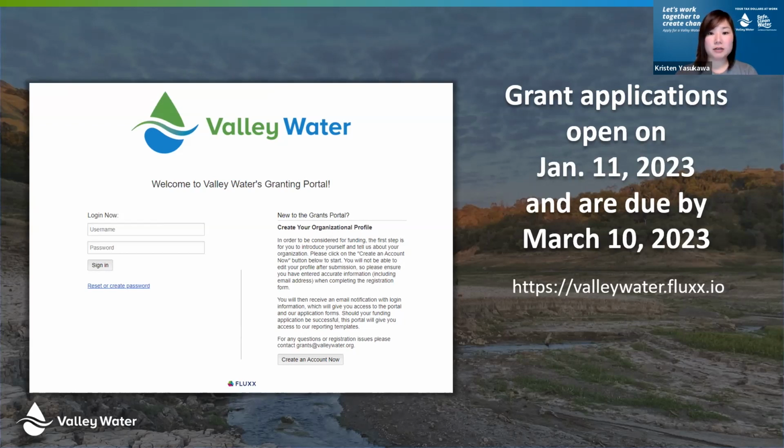Same thing would maybe go for a city owned or operated park or any park in another jurisdiction like Mid-Peninsula Regional Open Space District or other place. Sometimes, depending on where there are power lines and things, you might need a permit from PG&E. So it all kind of depends on where your location is.